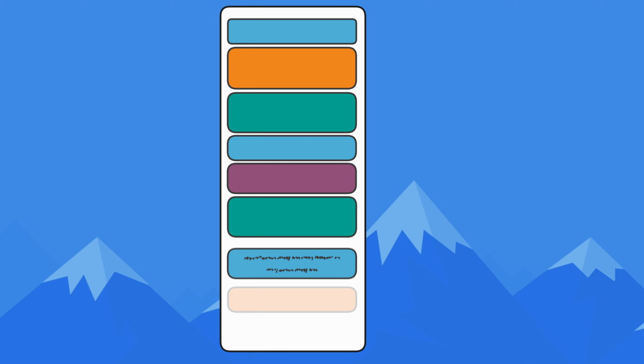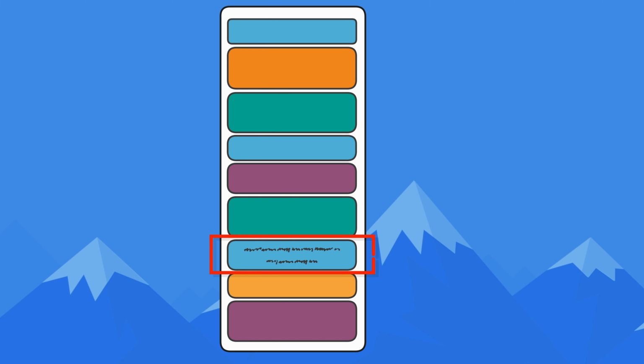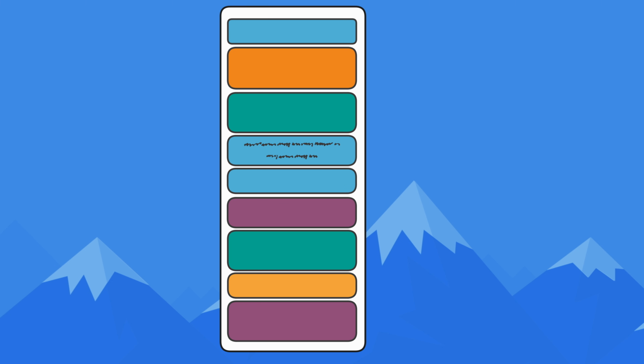The value of a feature and its cost, our first and second factors, are the most important. I recommend continuing to prioritize based on these, but then using the other three factors to adjust priorities. For example, suppose a product owner or product manager has prioritized an item such that it won't be done for another 3 or 4 iterations based on its value and cost. At that point, consider learning, risk, and dependencies. Move the item up an iteration or two if any of those factors is significant.